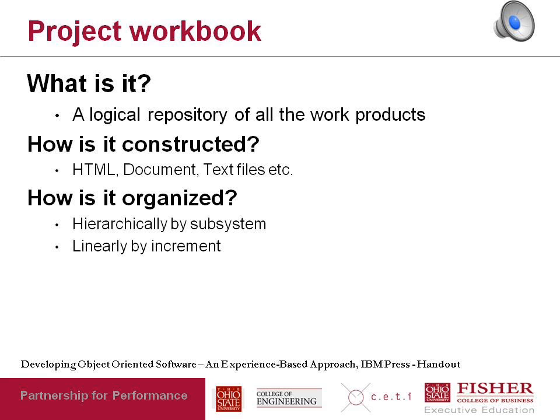Well, you might structure a workbook by subsystem. So let's say you're building a large system and it's broken up into multiple subsystems. You could have a workbook for the whole system linked to sub workbooks for the subsystems within that system. Or they might be organized by increment. So for the first increment, you have a workbook. For the second increment, you have a workbook. For the third increment, you have a workbook, consisting of all the documents, requirements documents, project management documents, source code, all of those things.